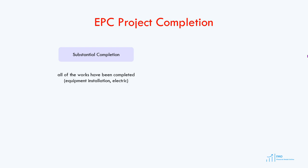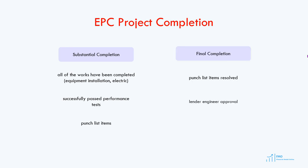Substantial completion is the stage when all physical and electrical works have been completed and the project has passed all reliability and performance tests, so the project is ready to operate. At substantial completion, there may still be small remaining items — such as painting, cleanup, and other minor works that do not affect performance — which are called punch list items. At final completion, all punch list items have been resolved and the project has been approved by the lender's engineer. At that point, all remaining payments to the EPC contractor are released.